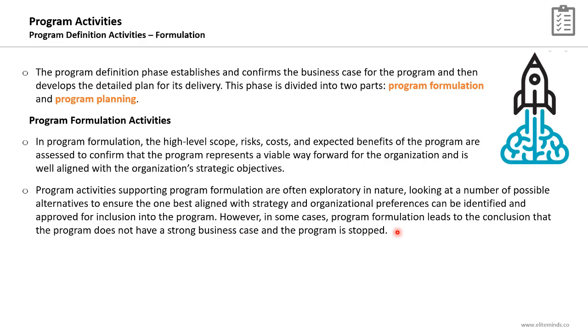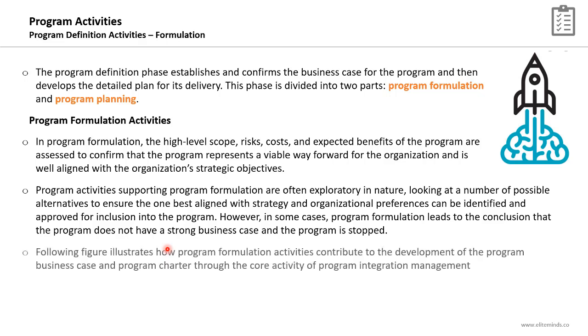However, in some cases, program formulation leads to the conclusion that the program does not have a strong business case and the program should be terminated or stopped. So it is normal at the end of the program formulation subphase to make a decision that we should not proceed with this program if the program business case was not clearly showing the justification of why the organization should proceed with this program.